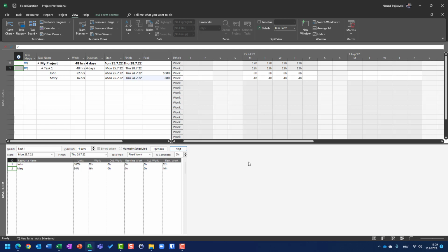Mary left the company. So I want to remove Mary from a task. Be aware, before I do that, that total work for the task is 48 hours. Why? 32 for John and 16 for Mary.